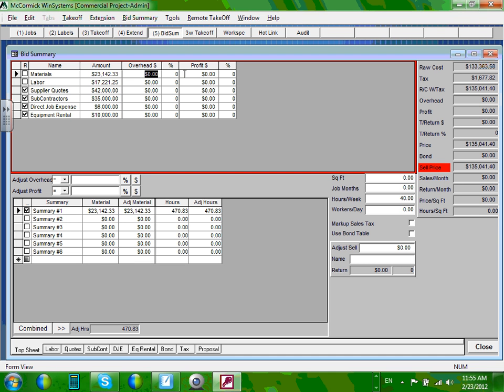They said it somewhere. Okay, the profit margin will be 10% and overhead 10%. Right here from Mr. Curdy. So we're going to have overhead on labor, of course. We're going to have overhead on labor 10%, and profit also on labor 10%. Go to the area that has the percentage, not like I did, and 10% overhead on labor only. Cool? So I have a 10% profit and a 10% overhead.